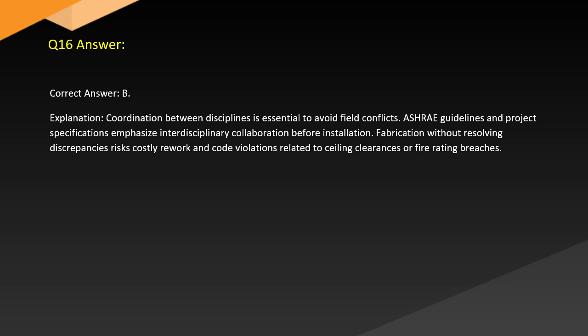Answer. Correct answer: B. Explanation. Coordination between disciplines is essential to avoid field conflicts. ASHRAE guidelines and project specifications emphasize interdisciplinary collaboration before installation. Fabrication without resolving discrepancies risks costly rework and code violations related to ceiling clearances or fire rating breaches.